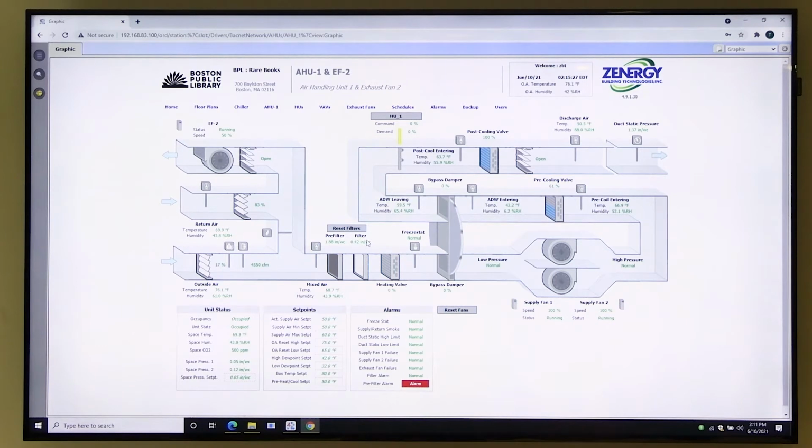So you all have the as-built built into the system? Yeah, we like to put them right on here. We're still verifying. We don't have our completed as-built because we're still in the testing phase. If things are changed, we'll want to reflect that in our as-built. So they wouldn't be on here yet, but we would get those on there once we have the completed ones.